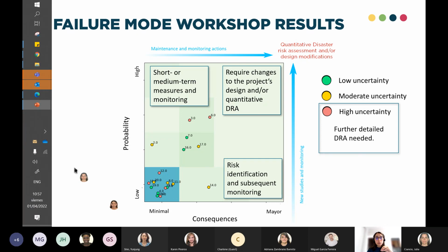And as this document is more dynamic, it can change as the project evolves. Then the results from that quantitative risk assessment say, okay, we now understand that the height of the water is going to reach 2 meters. So these houses in this area must be moved, or you have to build on stilts, or you have to build a 3-meter flood wall. That other measure is going to be included in the management plan that we already have. Is that clear?